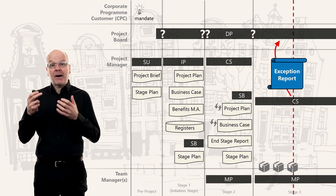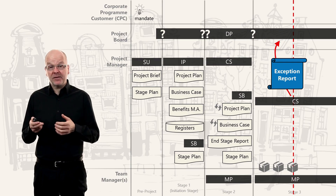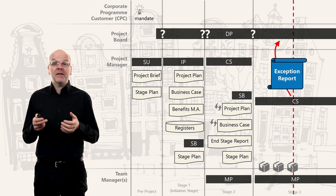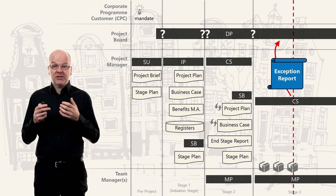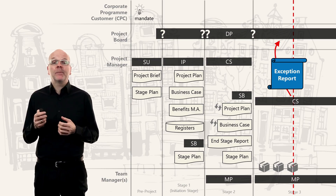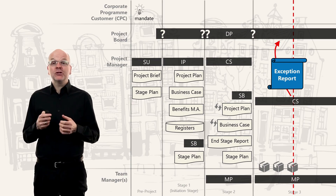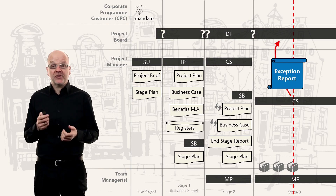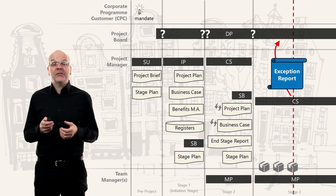This report is known as the exception report. It's like an issue report, but because it deals with an issue that brings the stage out of tolerance, it's called an exception report. It provides all the information needed for a good overview of the impact on the project and how we can deal with it. This report is then escalated to the project board.